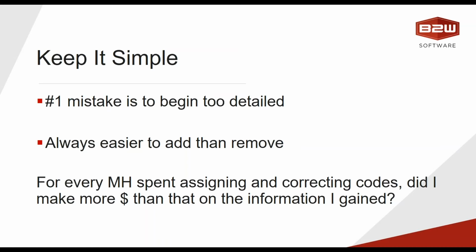So that's something that hopefully helps people wrap their minds around what's too specific, what's not specific enough. Do I need to understand for a business reason, for understanding my costs and my productions, the difference between A and B? If the answer is yes, then they each deserve a separate code. And if the answer is no, they can be at the same level together.